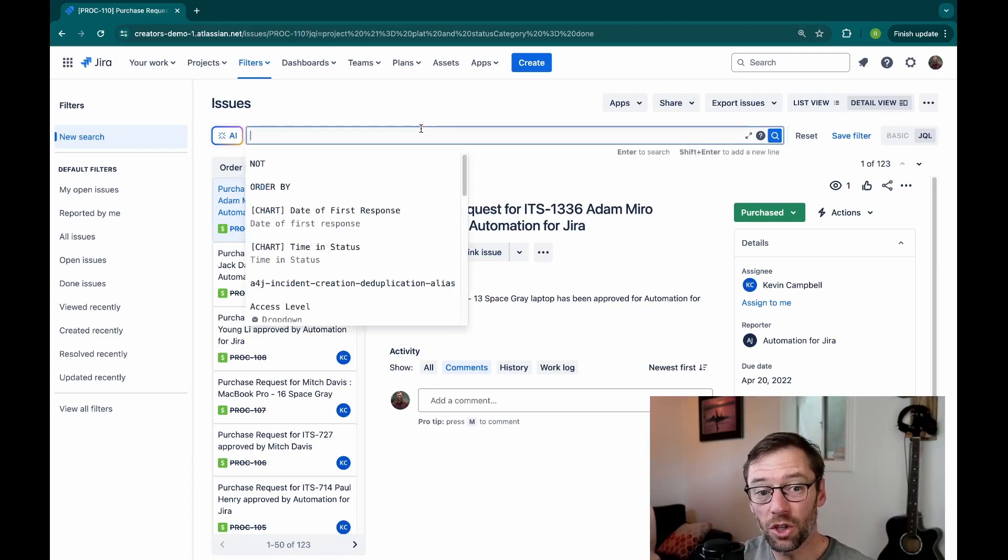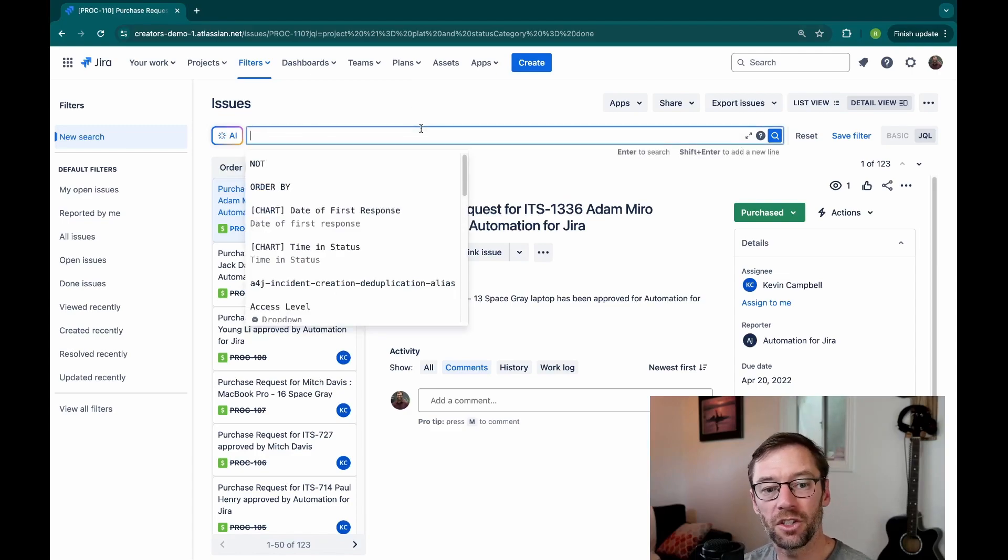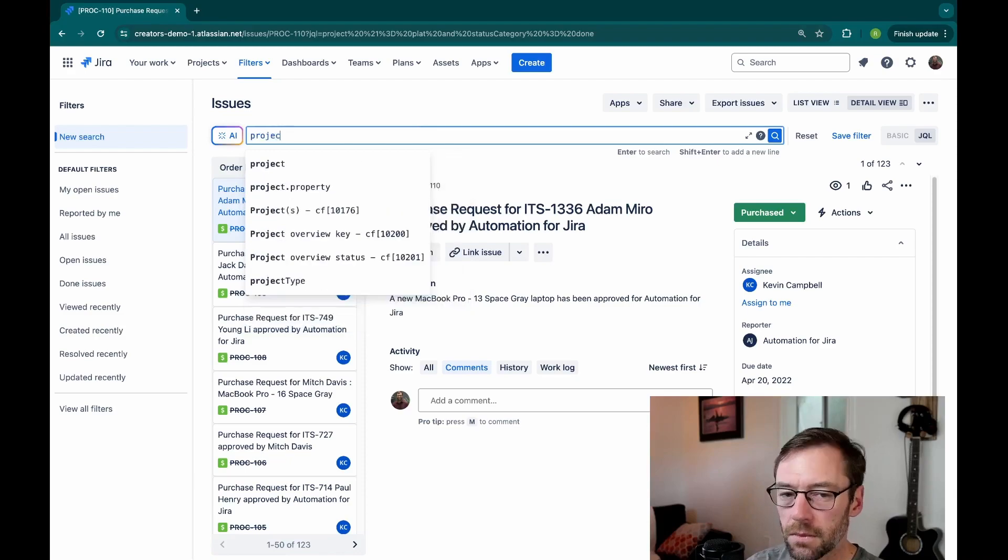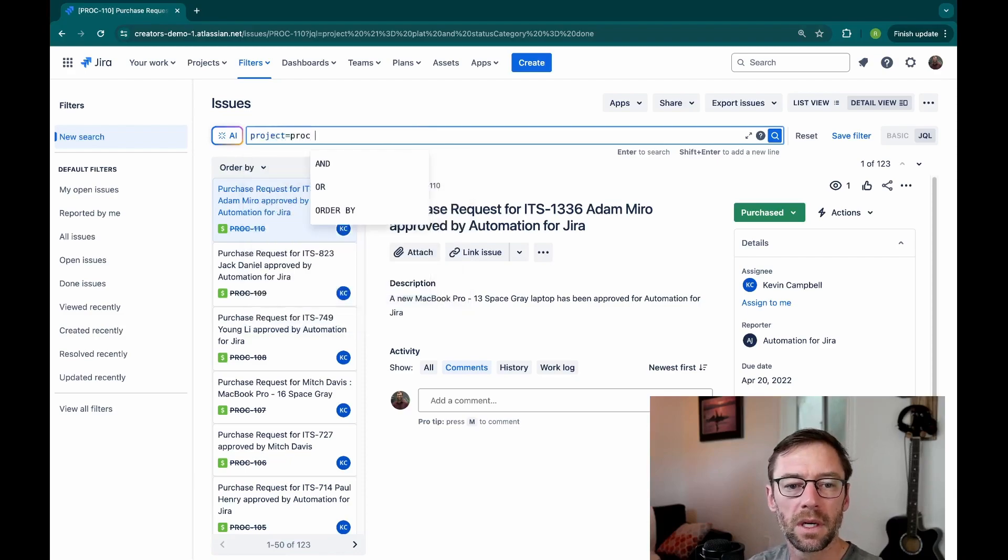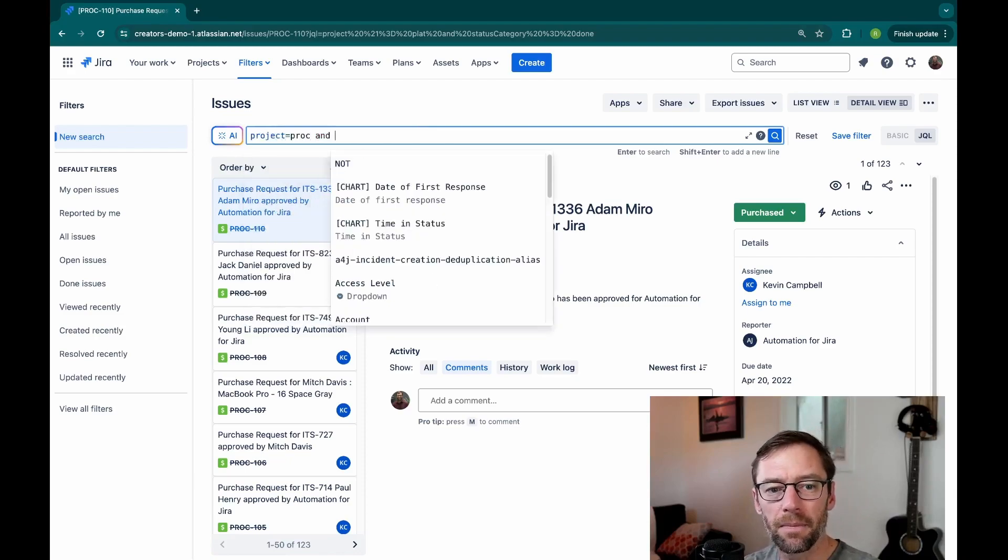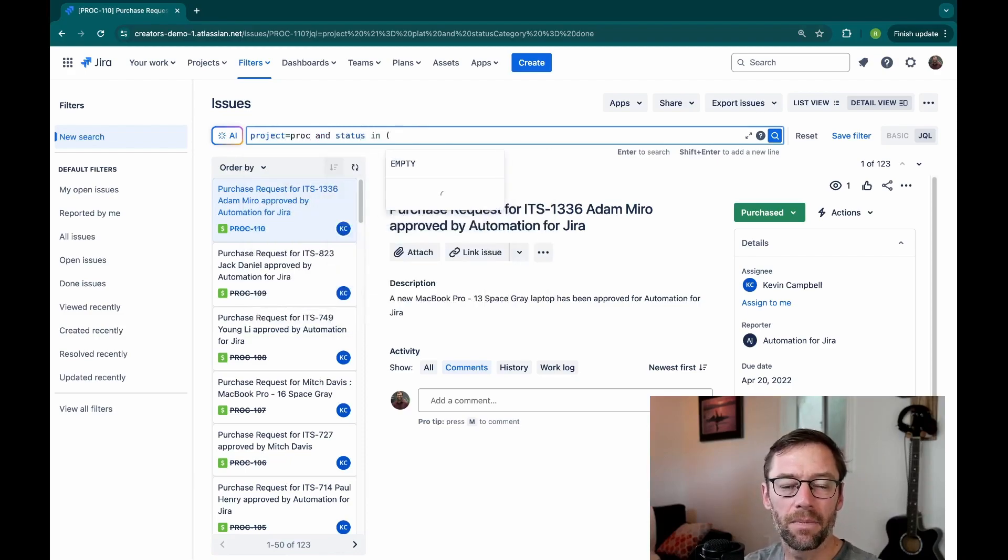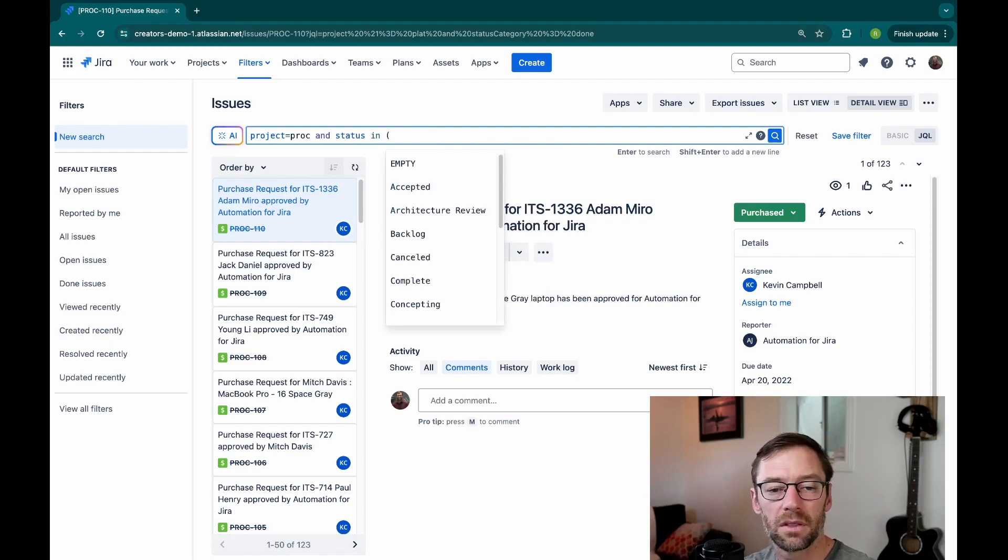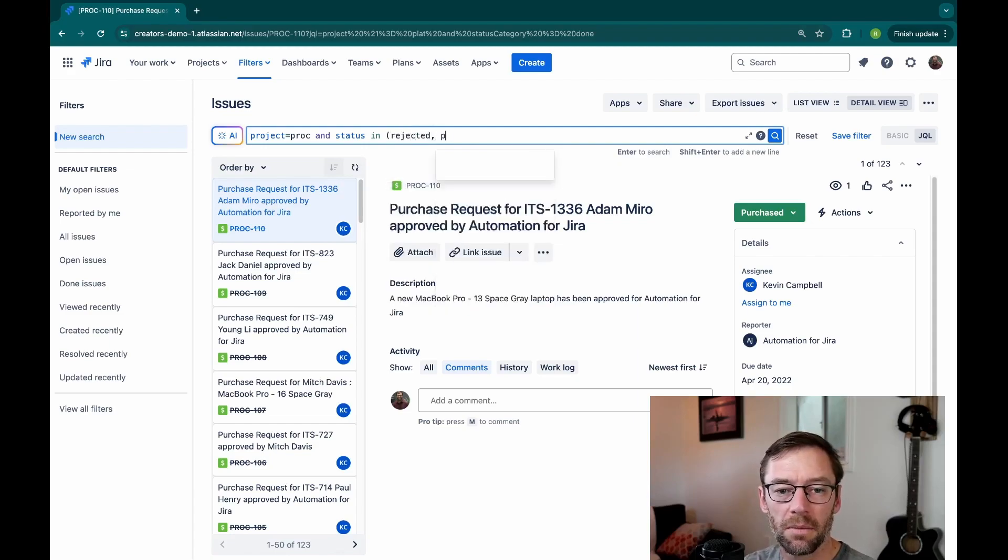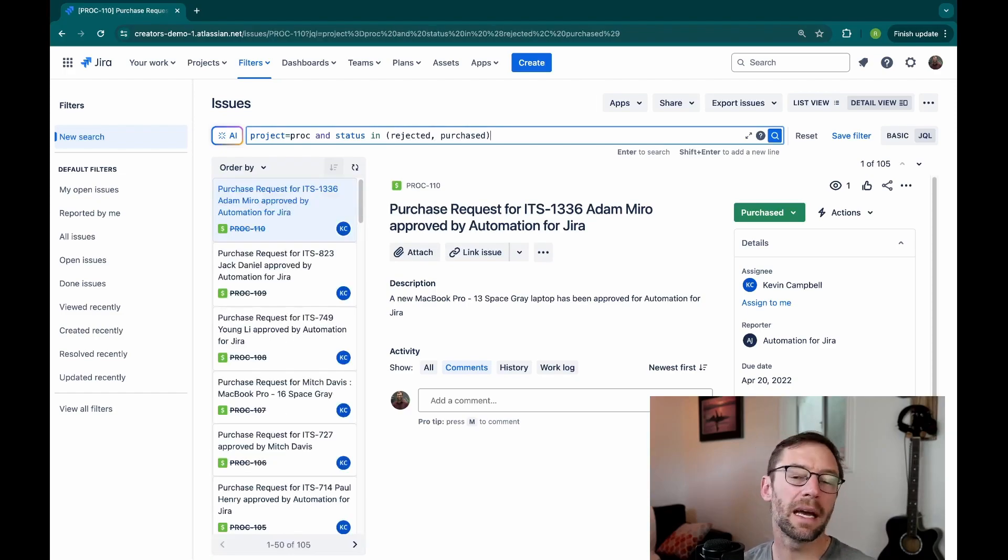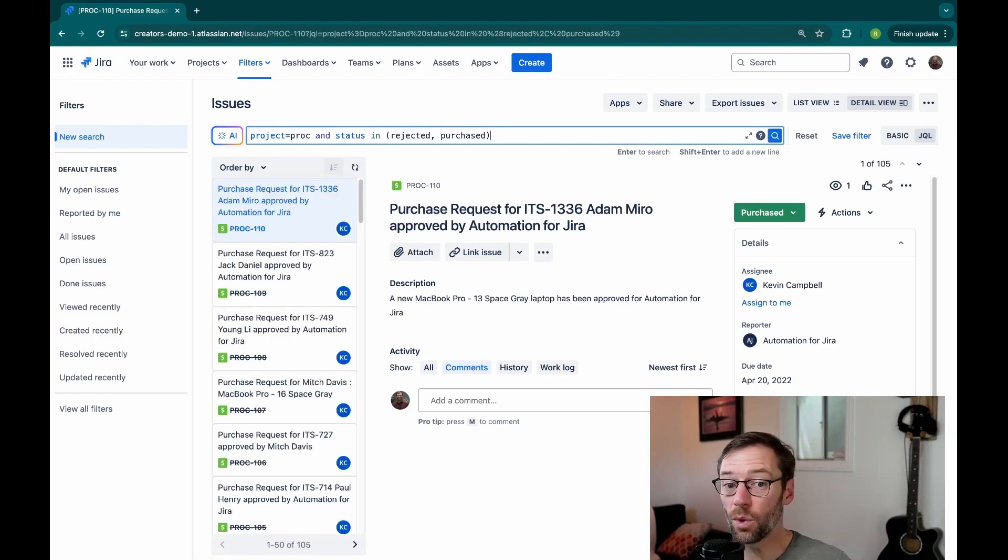So if I were to search for tickets in this project that had a completed status, one way I could do it would be to type in project equals PROC and status in a list of those statuses, rejected and purchased. And this will bring back a list of every ticket that has either one of those two statuses.